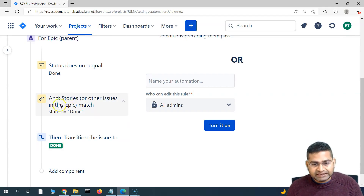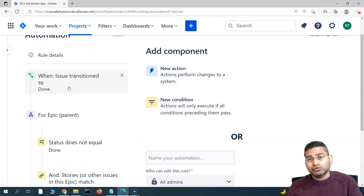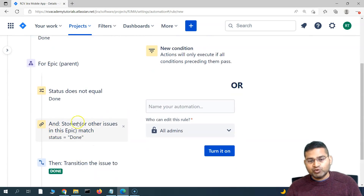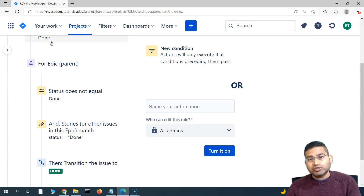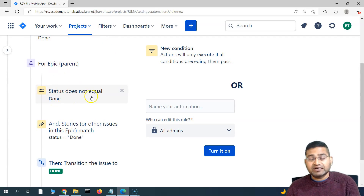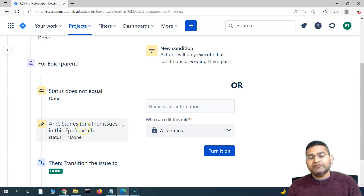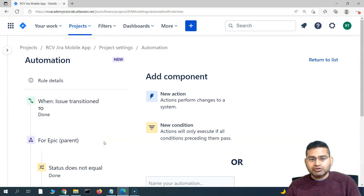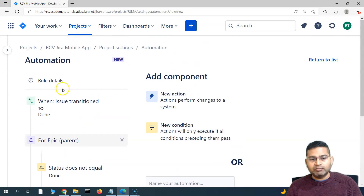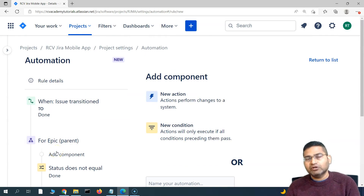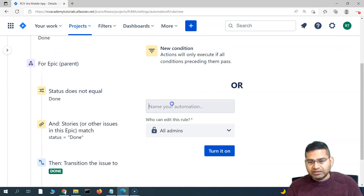Only if this is the last work item in the epic being transitioned to Done should the epic also transition to Done. If you remove the condition checking all other issues, then as soon as any single linked issue is moved to Done, the epic would also be moved to Done — because the only remaining condition would be that the epic status is not equal to Done. So this related issues condition is really important — it ensures all other issues are Done before closing the epic.